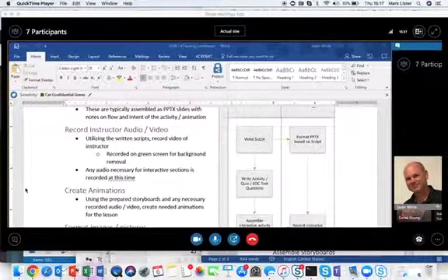The purpose would be to get it all together into an assessment, which hopefully would be useful to add some recommendations straight back to you, but also to frame up what we call the product backlog, which are the tasks and the priorities and the skills needed for us to get off to a running start when this team's ready to grab hold of the work. We'd be putting it all in order and building a backlog of work, with your complete agreement that it makes sense. We need to go through that exercise so that you don't have to, but also so that we understand it in our own terms, in our own language, and build the backlog for our developers to start the engine. Does that make sense?